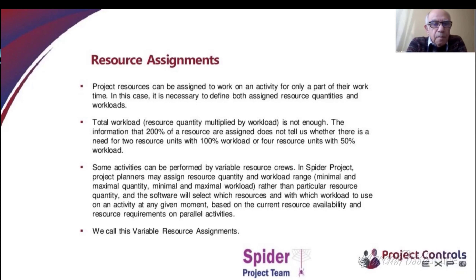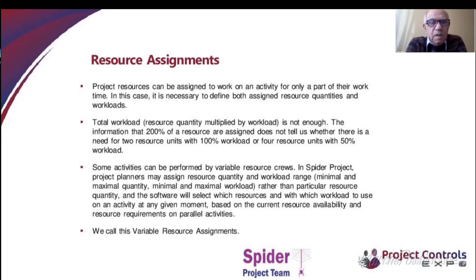Resource assignments may be partial — for example, assigning someone for 20% of their work time. Spider Project calculates and simulates partial assignments. When assigning resources, we assign both quantities and workload. It is not enough to assign a total workload of 200% for some resource, because you don't know if that means two resources at 100% or four resources at 50%. Spider Project therefore separately calculates resource quantities and resource workload.